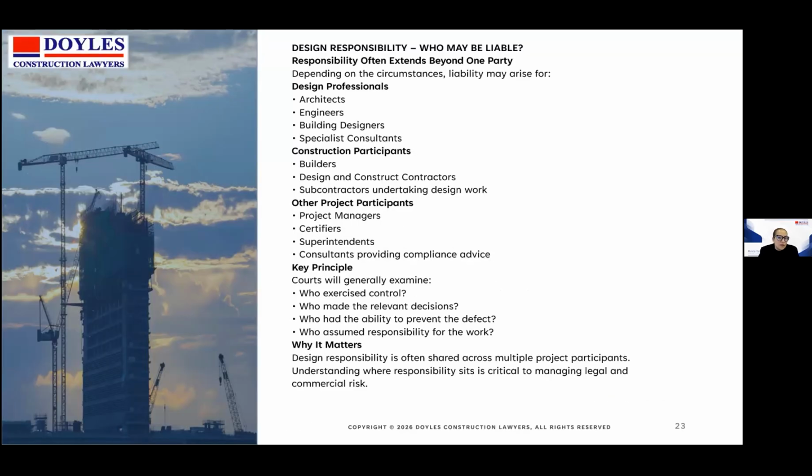So design responsibility. Who may be liable? This responsibility often extends beyond one party depending on the circumstances. And liability may arise from design professionals such as the architects, engineers, building designers, and specialist consultants. What the court asks is who had control, who made the decisions, and who could have prevented the defect.